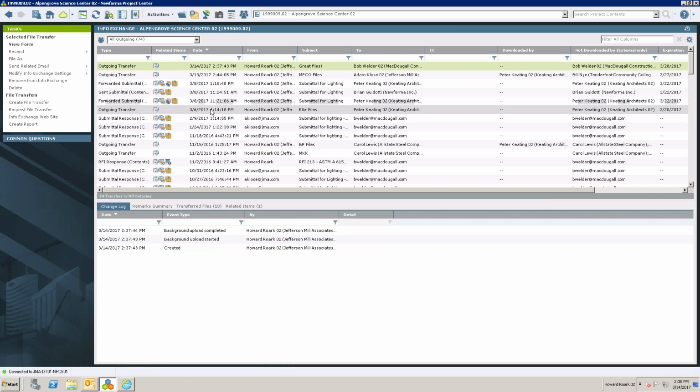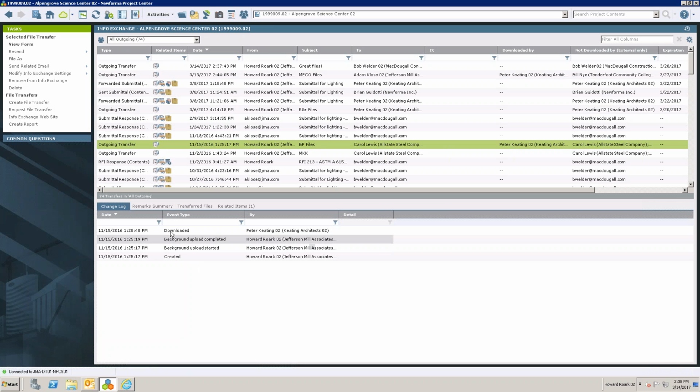If I go to a different one, let's go to the R&R files or the BP files, it'll show me Peter downloaded this on the 15th of November at 1:28 p.m. So when Peter calls you and says, hey, I'm sorry, I never got that drawing or I never got that document, I built it wrong, you can say, well, Peter, you came in here and you downloaded this on the 15th of November. You're going to have to pay for that issue, right? You have the information in order to make those calls. You have the information to say, well, Peter, yeah, you did download it, and I have a record associated with it.